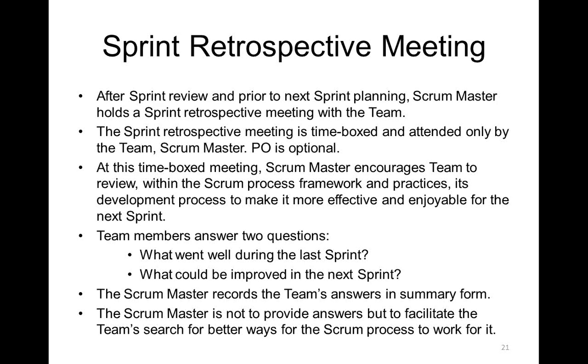The Scrum Master again facilitates this meeting. This meeting is a kind of private meeting where the team could also wash their dirty linen, whatever hits and misses they had in that sprint. Somebody may have complained against another member, that they could have collaborated better. Somebody was lacking something, or something could have been done in a better way by some other member, and things like that. So all those things get discussed in this retrospective, and based on this learning, they decide how to do the next sprint.